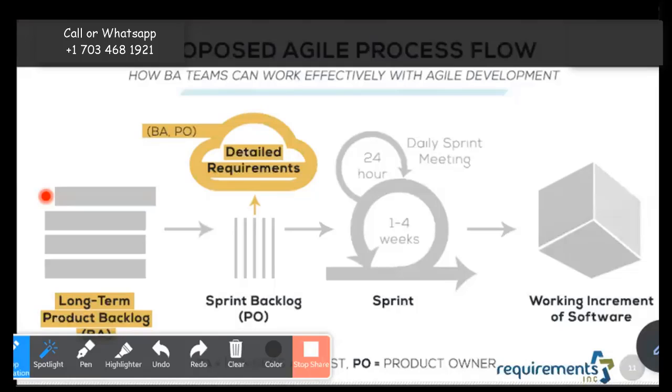And then you start putting sticky notes to it. What are these sticky notes? Okay, to build that first user story, what is it that I have to do as a developer? So I would put up blue sticky notes, just work with me conceptually, right? I would put up blue sticky notes to denote all the developmental tasks that I have to do. This is task 1, first sticky. I'm estimating that it'll take a couple of hours, 2 hours. And then here's my other task I have to do. This might take 1 hour. This is the third task I have to do. This might take 30 minutes. The first thing is I have to talk to the time tracking development team to understand their data structure.